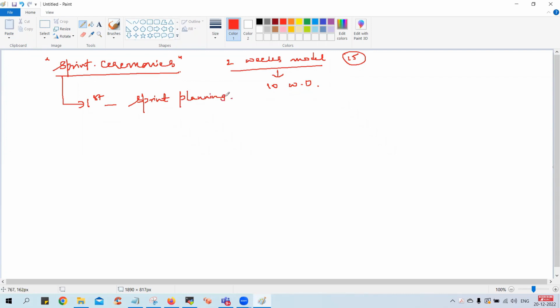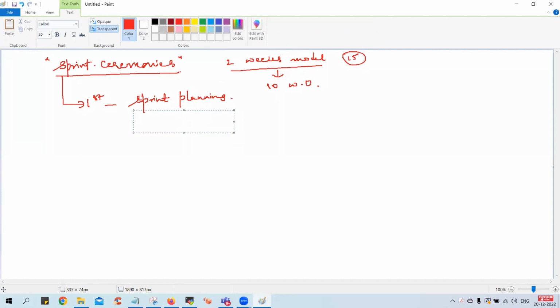They will have something called sprint planning, guys. In this, the entire team will sit for a discussion and talk about what items they have to work on, and they will distribute the items to the team. You got it? Whatever items they have in their bin, they will discuss what needs to be done. Based on the skill set of the candidate, they will transfer the ticket into their bin. Got it now?